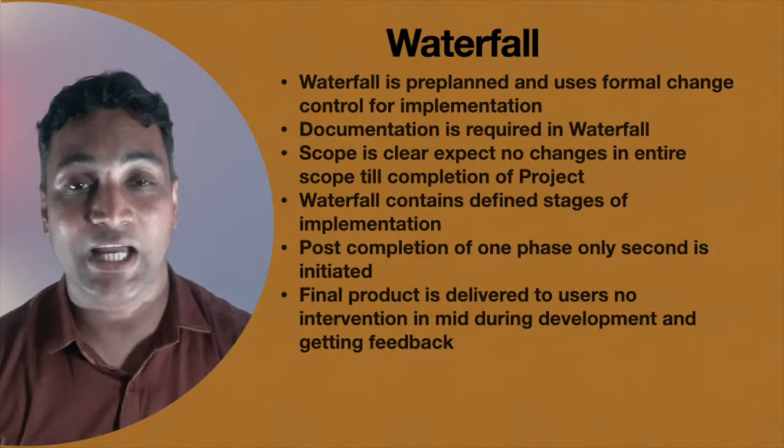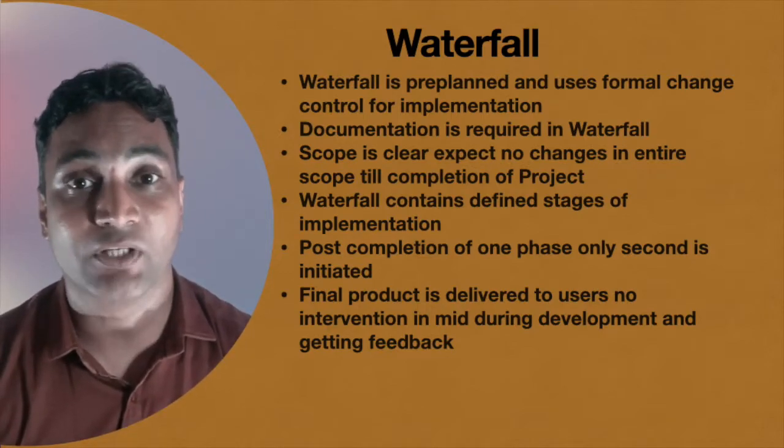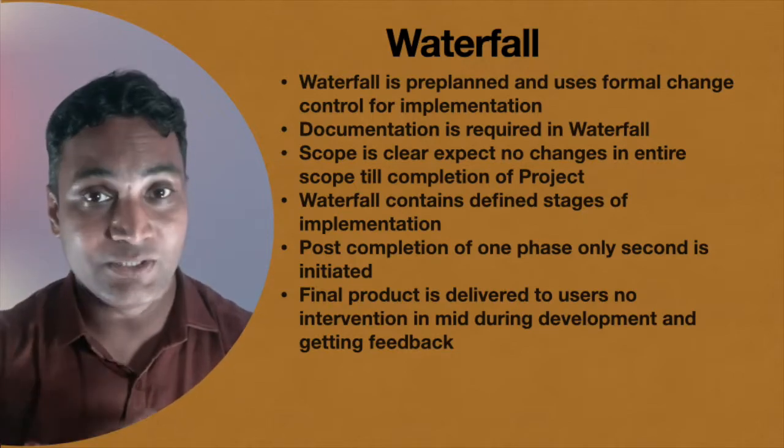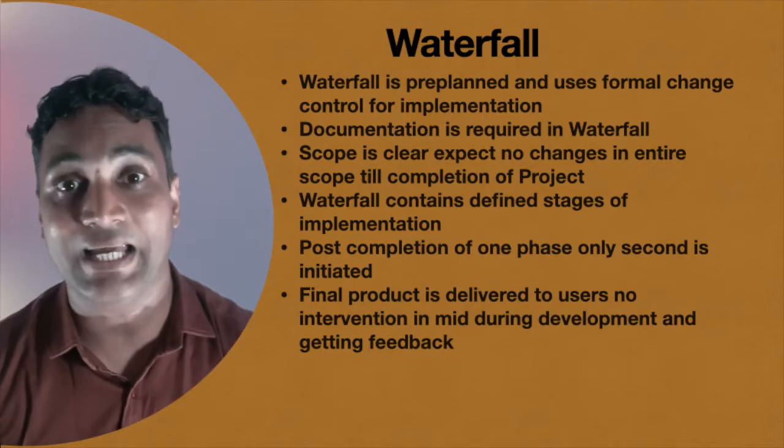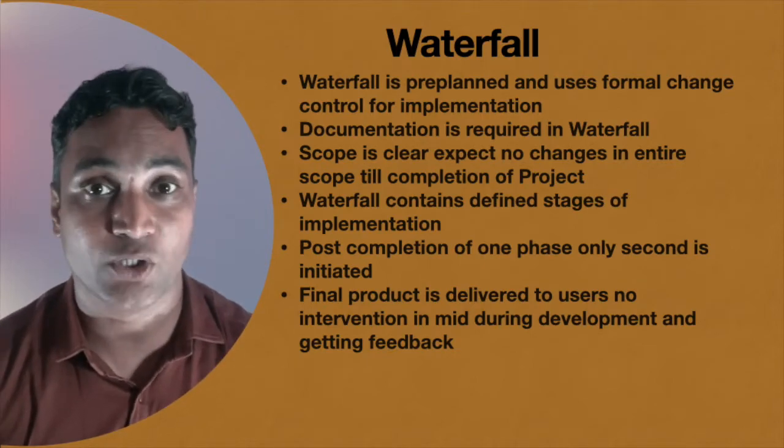Waterfall is a risky approach because if some of the scope changes in the middle of the project, then it is very tedious to go back to the initial phase and do a scope change. It can impact the time and cost as well as the schedule of the project.